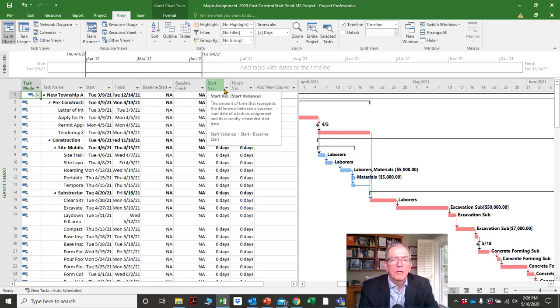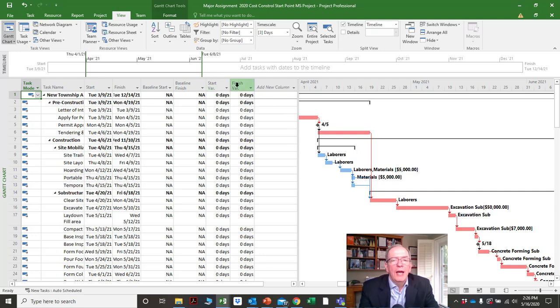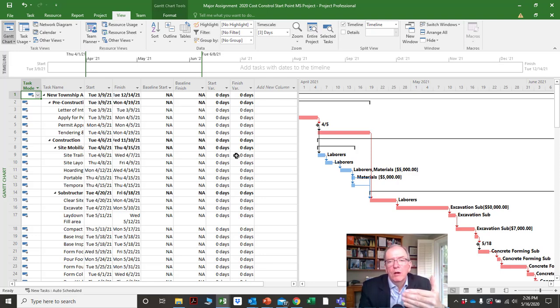So now we've got baseline start and baseline finish — which is different from just start and finish — and that will give us variance. Variance is just another way of saying the difference between the plan and what's actually happening.